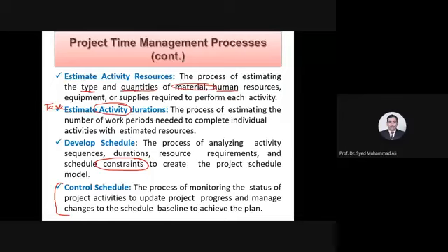Whatever you are going to break down, that this activity should start at this time and finish at this time, then there has to be a mechanism in the field to monitor that, record that, and give this feedback back to the planning team so they update their schedules according to the actual time of start and when it actually finished. So breaking down something to such a minor level in a civil engineering project may not be advisable, for example. Anyways, we're talking of control.